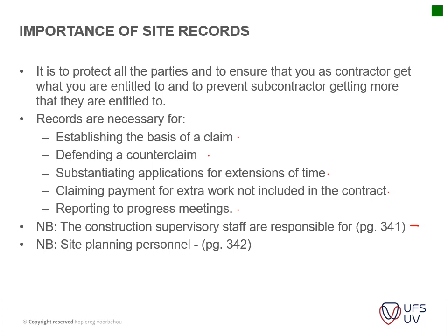Whereas on page 342, the site planning personnel should be responsible for updating the short-term program each week or fortnight, recording progress each week on all the relevant construction programs, e.g. weekly, monthly or so. Preparing records for contract as-built programs as work on site progresses, then recording the effect of program delays on the final account completion date.